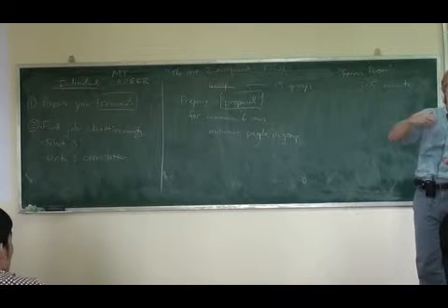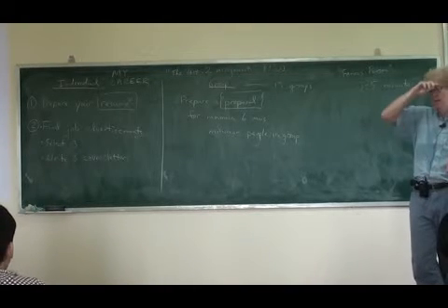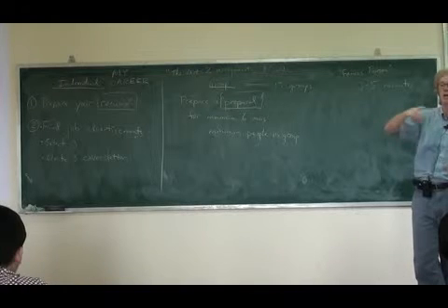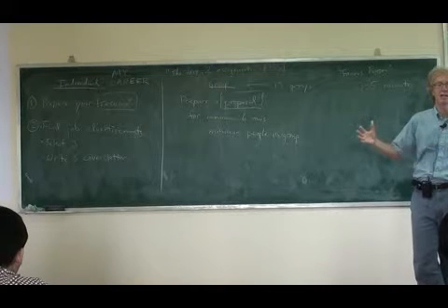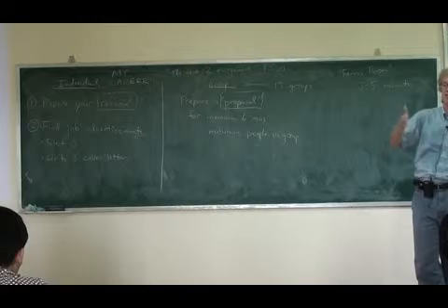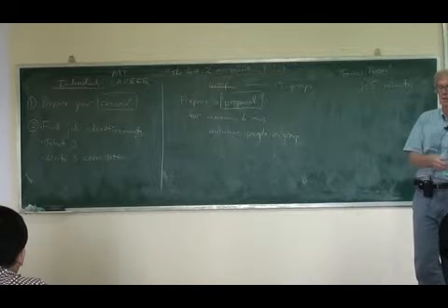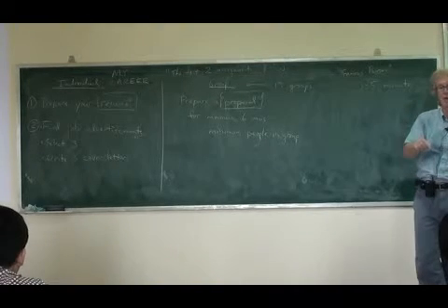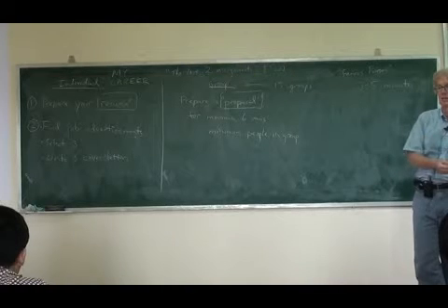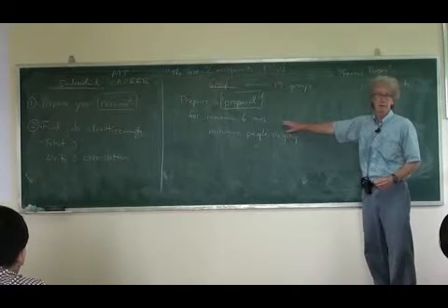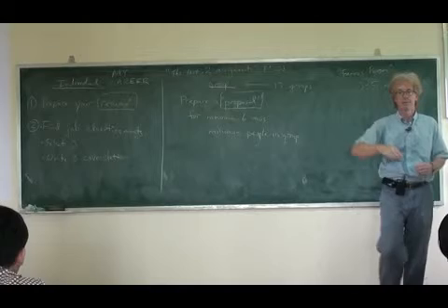So for instance, if I'm a big consulting company, maybe I have 10 projects going on at once. Some of those projects last 5 years, but they're not 5 straight years of 100% employment. It's like I'll work on this for 25% of the time for 5 years. So that would count as 1.25 years, right? 25% of 5.